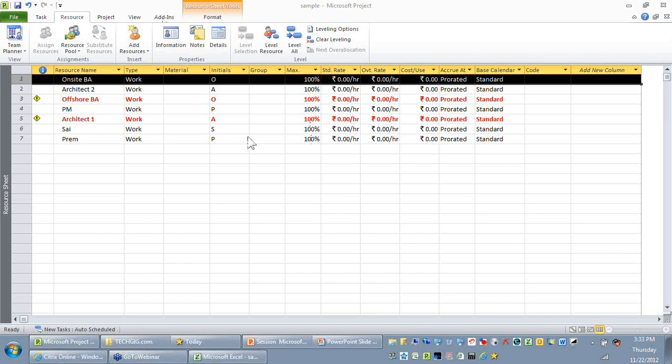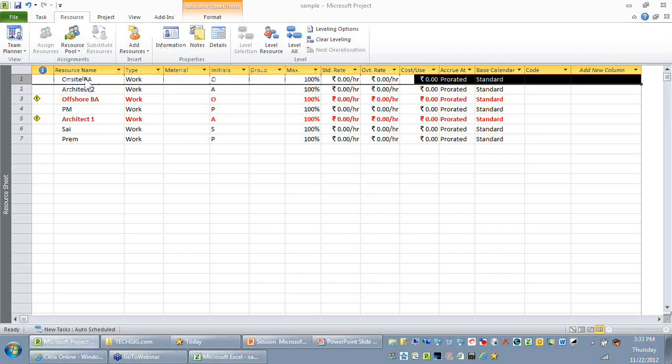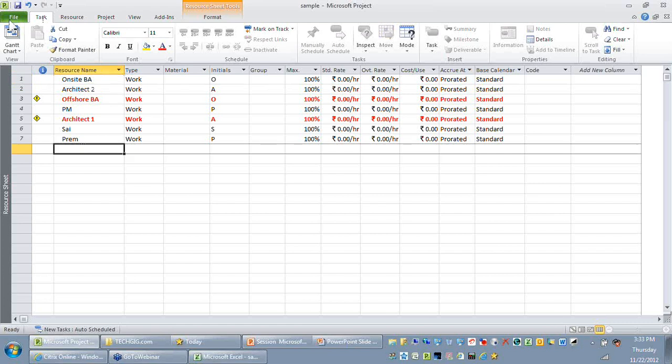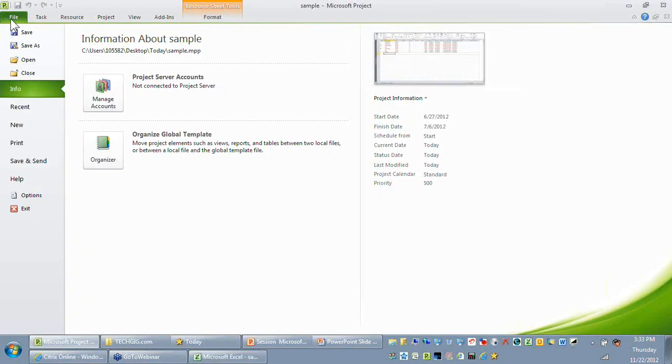Okay, how do you export MPP to HTML file? Okay, since I need to deploy an HTML report daily under a server, how do I do that? This was a question from Divesh Kumar. Divesh, in project 2010, the answer is no. You cannot export your project plans to HTML in project 2010 because that feature has been removed in 2010.